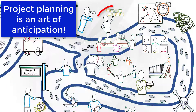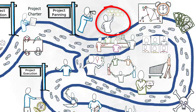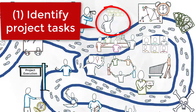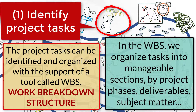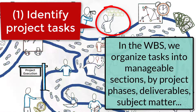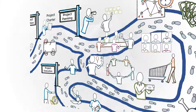First step: identify project tasks. The project tasks can be identified and organized with the support of a tool called WBS, Work Breakdown Structure. In the WBS, we organize the tasks into manageable groups — that can be by project phases, deliverables, or by subject matter.